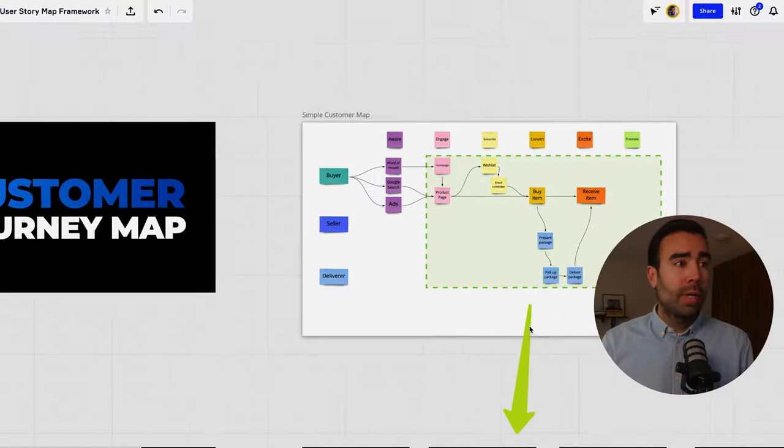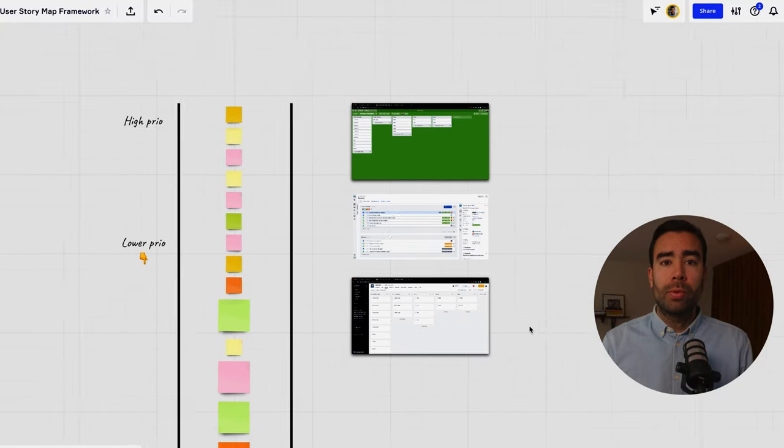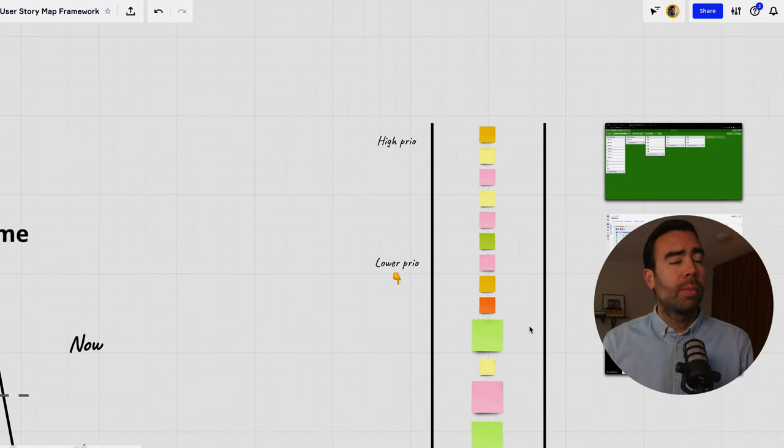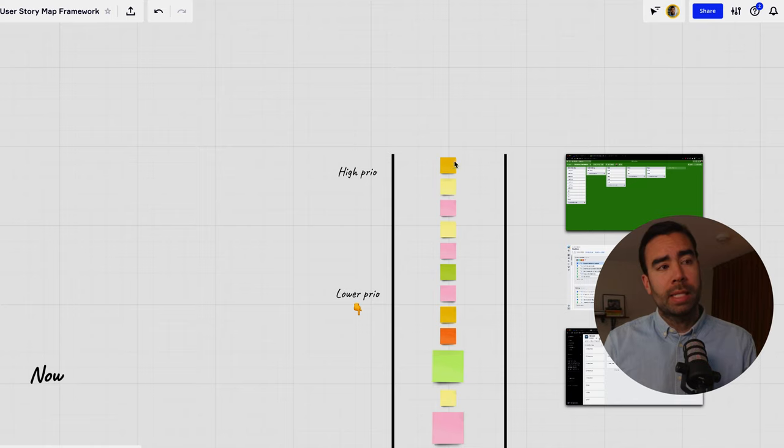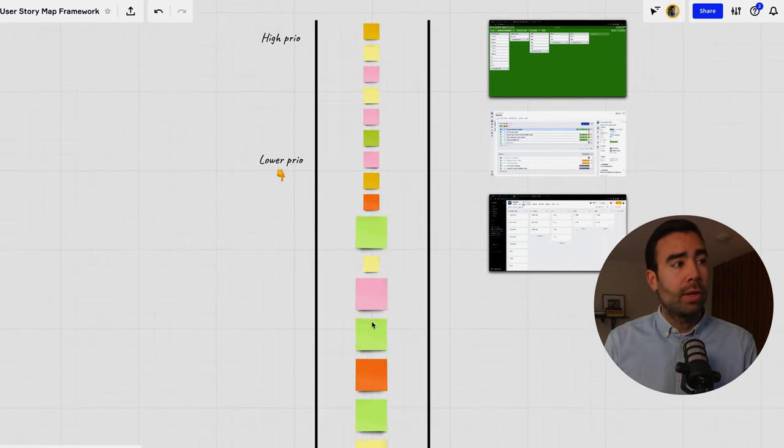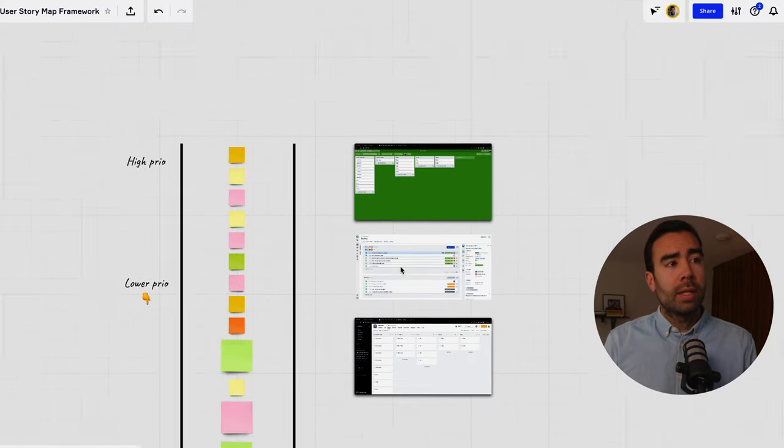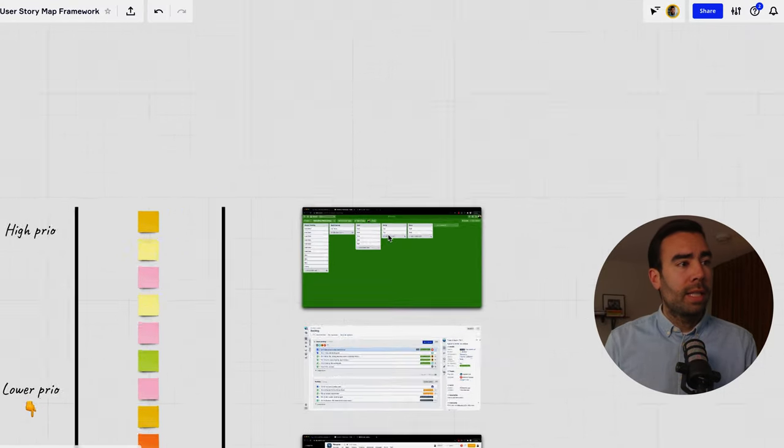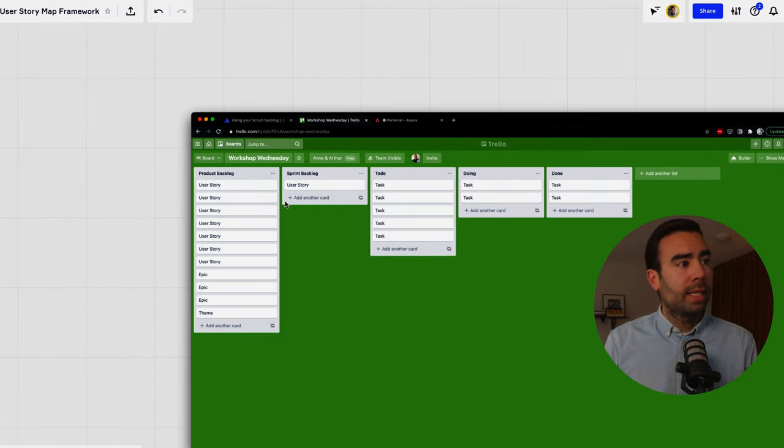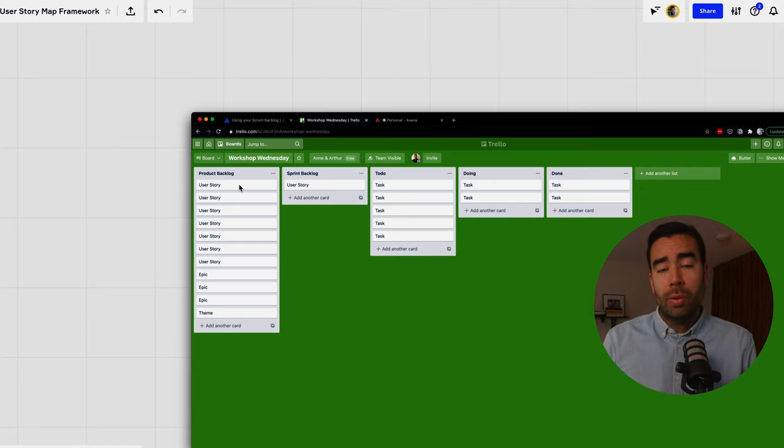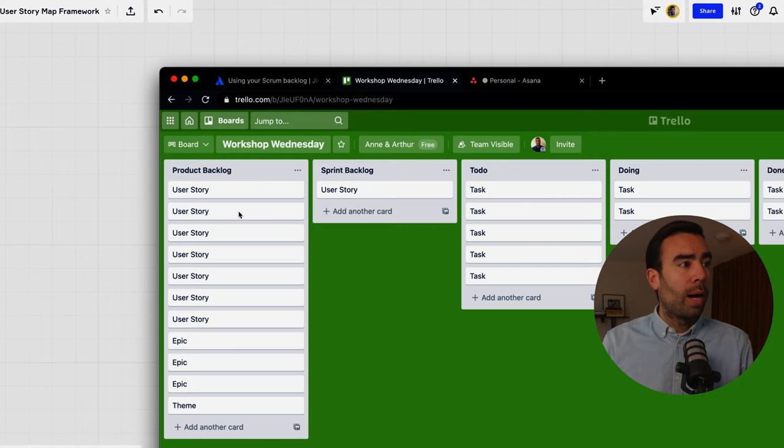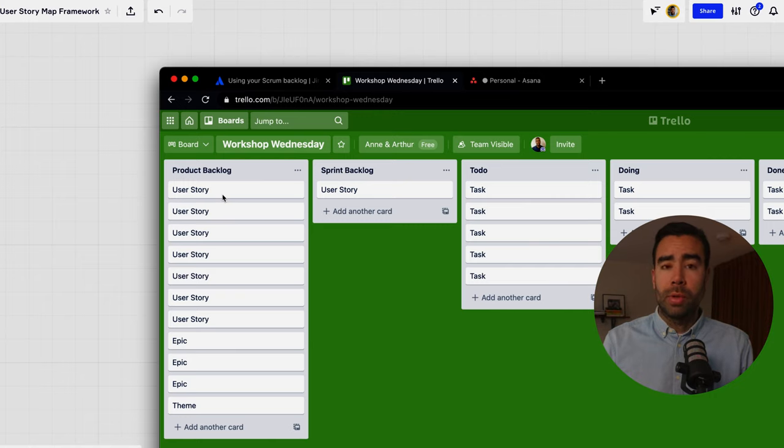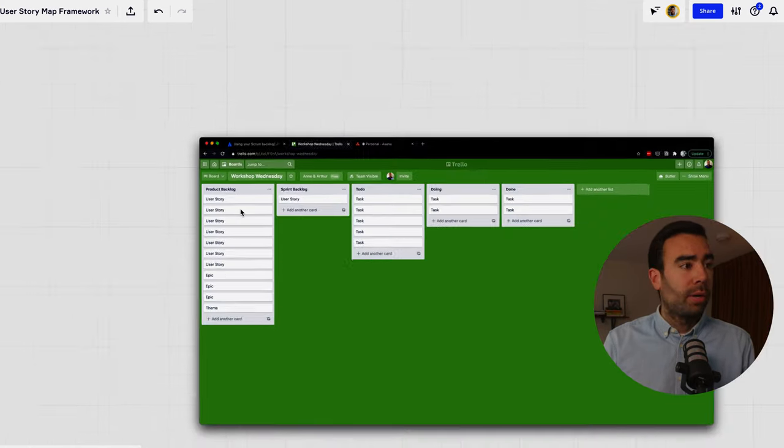Before we do that why even go through the trouble to create a user story map? Why not just make a simple list like this where the highest priority things are on top and then everything that's lower priority comes below it? That's because if you do that in Trello for example then you can see that it can become quite messy quite fast so it's really hard to see here why this user story is on top and if it's actually the one that has the most value.